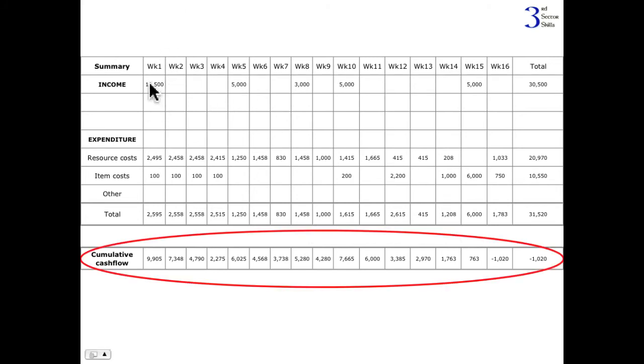So here all I've done is take £12,500 in, £2,500 out, leaves us with a positive balance of about £10,000. Great. And as we spend the money, as we go down towards the right here, we can see the positive cash balance is decreasing. Oh, we get a big bump in here, another 5,000 from the local authority. On it goes, etc, etc. Looking pretty good. So far we haven't gone overdrawn on our bank balance until here.